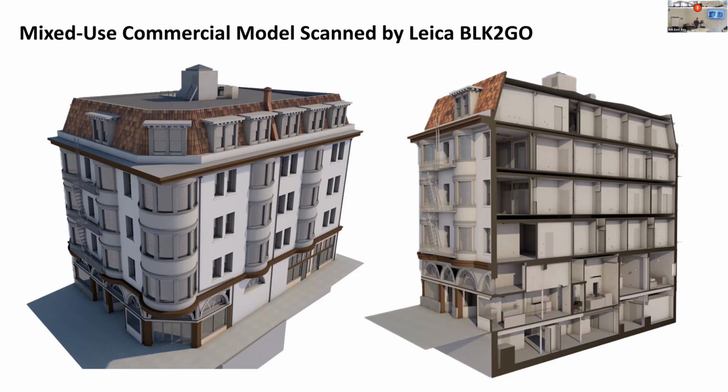Yeah, and if you want to add an electrical plan, add an hour, just real ballpark. We've done, let's see, 8,000 square foot properties with floor plans, roof, exterior elevations, electrical, and RCP. It's either 2 days on site with the surveyor, or we send 2 surveyors. It'd be one day. It just kind of depends on our availability.